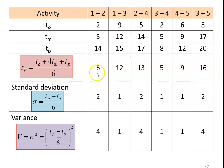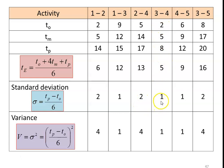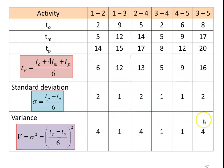We calculate TE for all activities; the values are 6, 12, 13, 5, 9, and 16. For standard deviation, the formula is sigma equal to (TP minus TO) divided by 6, giving values: (14-2)/6 = 2, (15-9)/6 = 1, (17-5)/6 = 2, (8-2)/6 = 1 (corrected: 8 minus 2 = 6, but note pessimistic for activity 3-4 is 8 and optimistic is 8, giving 0; speaker says 1), (12-6)/6 = 1, and (20-8)/6 = 2. The variances (sigma squared) are 4, 1, 4, 1, 1, and 4.